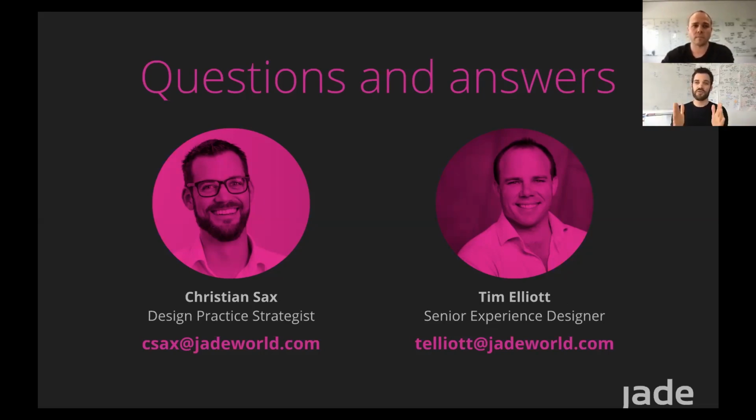Some people do shorten it to 3 days, not 3 weeks. But it depends on the prototype, because sometimes you just need that 1 day to create it. If it's maybe a smaller tweak on an existing system, it's possible. So I would say case by case. Generally 5 days is a good time, but for 3 days, we need your team for the first 3 days, and the Thursday and Friday can then be more led by us.